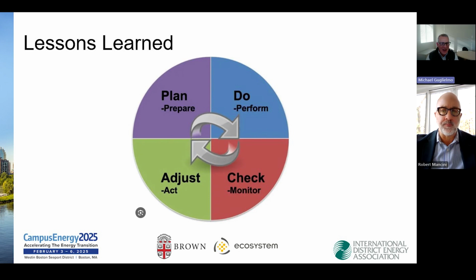Yeah, so there's essentially five that I think about on a daily basis when it comes to our decarbonization journey. The first one goes back to the thermal efficiency project, where outcome-based, results-driven contracts lead to highly collaborative strategies and solutions where we maximize limited funding. You know, Bob paused for a moment, and in the earlier slide where we were talking about we were going to allocate about $16 million worth of work and spending $7 million more, we were able to have a transformative project that was measurable with those specific outcomes that were absolutely fantastic for the university.